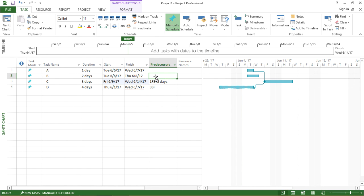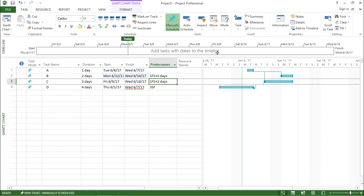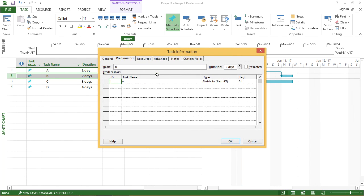Similarly, I can also give the predecessor relationship by typing. I type 1FS+3 days — that is a finish-to-start relationship with three days of lag. It will take task ID 1 and apply three days of lag. If I hit Enter and look at the right-hand side of my screen, it has taken a lag of three days excluding Saturday and Sunday, so task B will start after three working days — that is Monday. If I double click on this task, it confirms three days of lag.